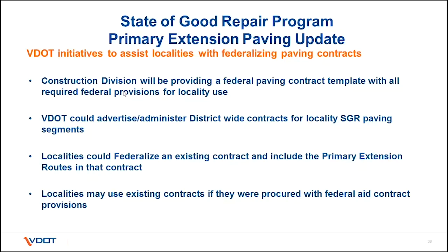So that kind of covers it. I will just hit the obvious. We were talking about the last question before I got started about cost. We're about 6% for contract administration on the back end for construction cost, based on my understanding from previous conversations. That's billable to the project. It's a project expense, but it is about 6% on our side to actually administer the construction of the contract.